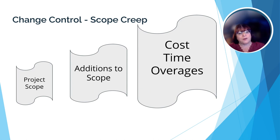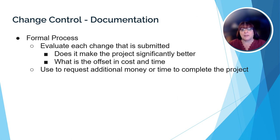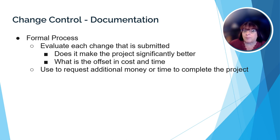Every time a small change is made to the tasks of the project, it affects the original idea of the scope and leads to what we call scope creep. It starts out as just a little change, gets a little bigger, and eventually becomes so different that it affects the triple constraint. So how do project managers keep scope creep from happening? Most project managers will include a section in the planning documents that details the process to be used for making change requests to the scope of the project.